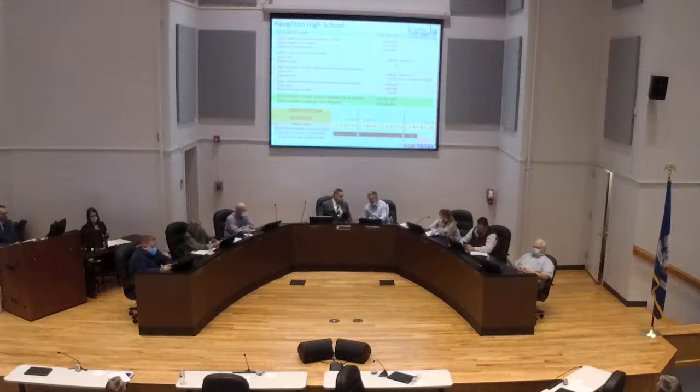High school, you've got a total project budget of $16,784,000. The classroom wing has a total right now of 12.7 with a surplus of 3.3 change. The other projects, the football stadium, was drained a couple of years ago. That's been completed. There's no surplus on that one. The baseball facility has a tiny surplus of about $1,600, and on the bleachers, we've got right at a $3,000 surplus for a total of $3,378,000.